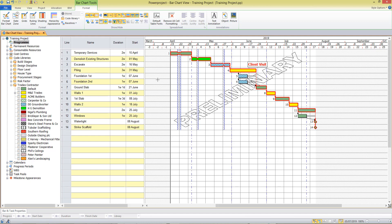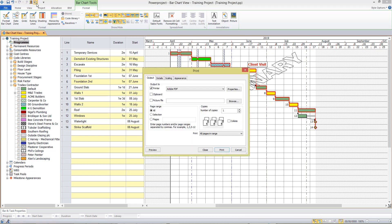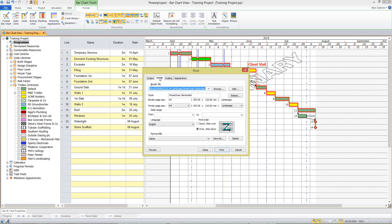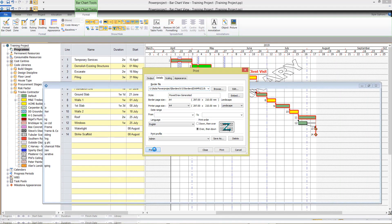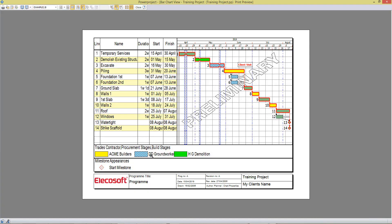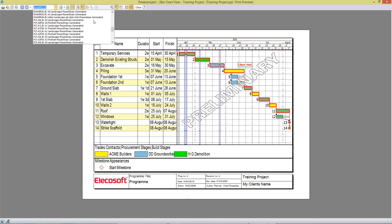When I'm ready to print, I can come up to the print icon on the quick access toolbar. Here I can choose to print to PDF or to paper, or to clipboard if I want to paste it into a PowerPoint presentation. On the details tab, I select a border to print with my output. Clicking preview shows how it will look — any code libraries that have been used will show a legend, and there's also a legend indicating what a milestone is. My border shows the main project information at the bottom of the page. There are many borders supplied with Power Project.